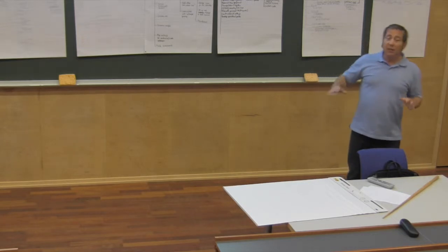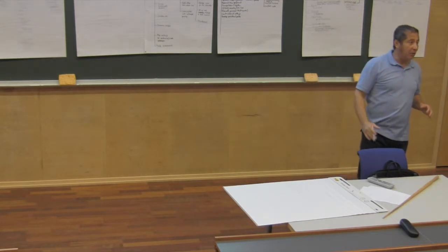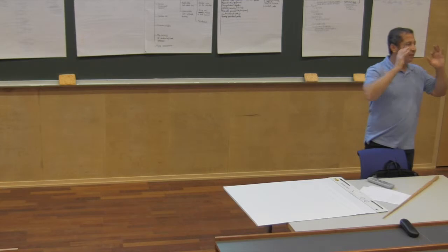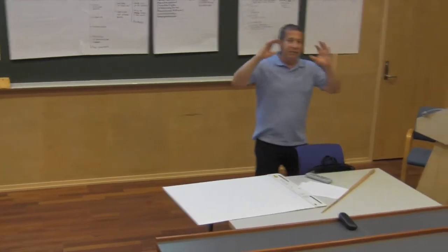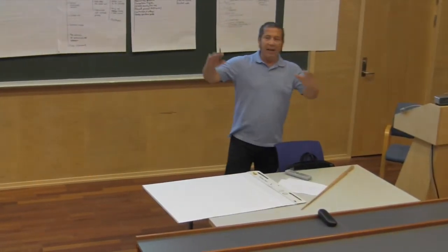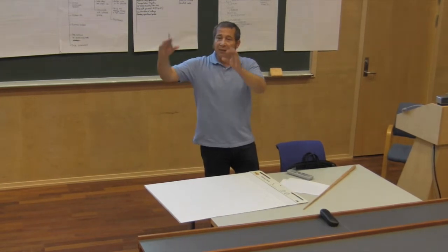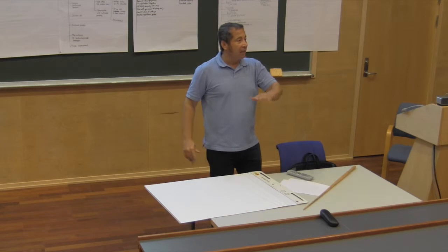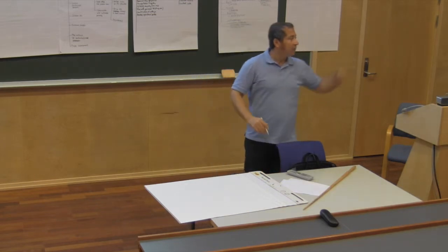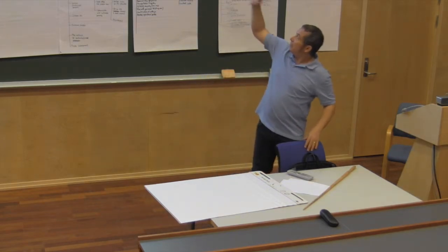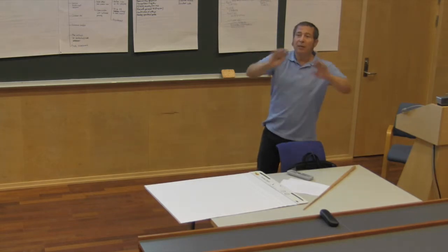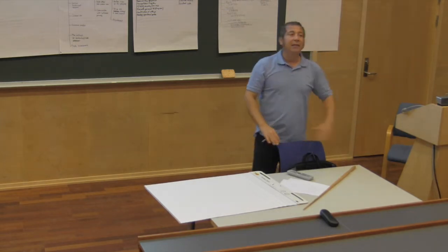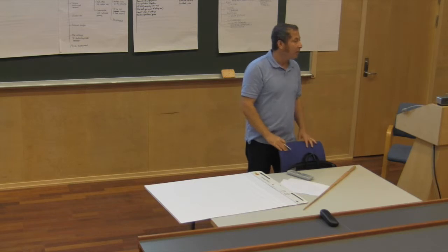And then they said, after we complete this pilot stage, what do we have? We have a training guide, we have a verification model, we have a model that is really fit for the purpose. Then the main stage is to roll out. Just airport 1, airport 2, airport 3, just put them into operation in the 19 airports that we have in Norway.